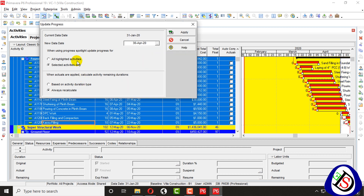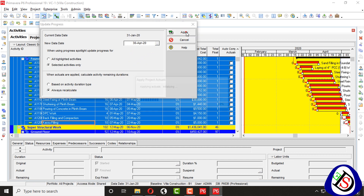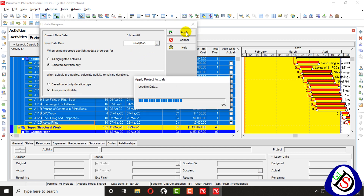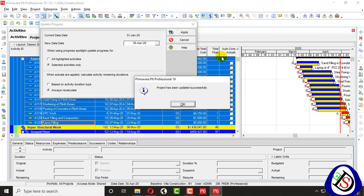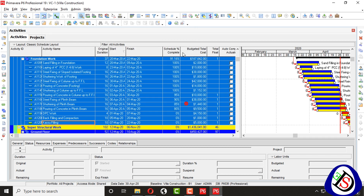All highlighted activities — you can select and update on selected activities only. You can update based on duration, or recalculate the activities. I will apply: selected activities will be updated only.